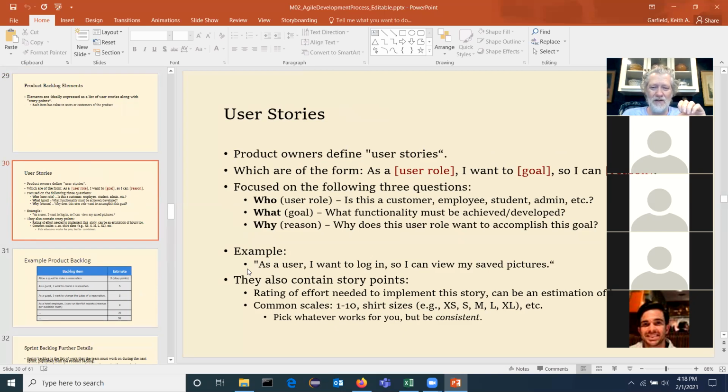Efforts. I'm going to ask you to just estimate hours, and you're not on the hook for that. You might find that you estimated some hours for a user story, you did another user story, and it turns out you realized it made the other one a lot easier. You could go back after the sprint. You can't do this in the middle of a sprint. After the sprint, you can knock it down, or you may knock it up. You might raise it higher.